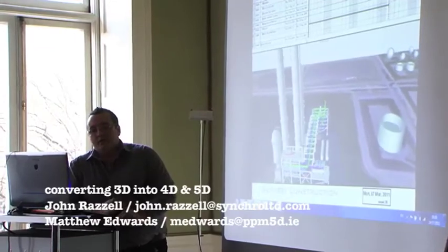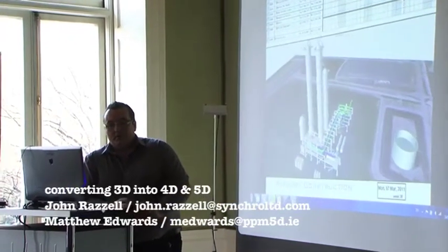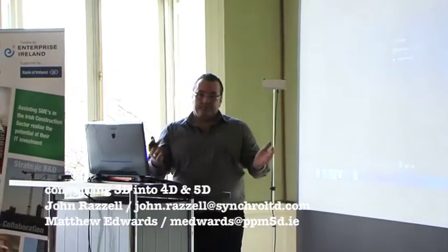And obviously when you're building things constructively, you go back to the concrete slab again. The concrete slab, say 3,000 cube. You're not going to pour that in the middle of Dublin in one day. You'd be hard pushed. So that's why you have to look at constructability in its true format. Because once things come in constructability, you can use them in the other dimensions as well. And that's the thing about IPD.